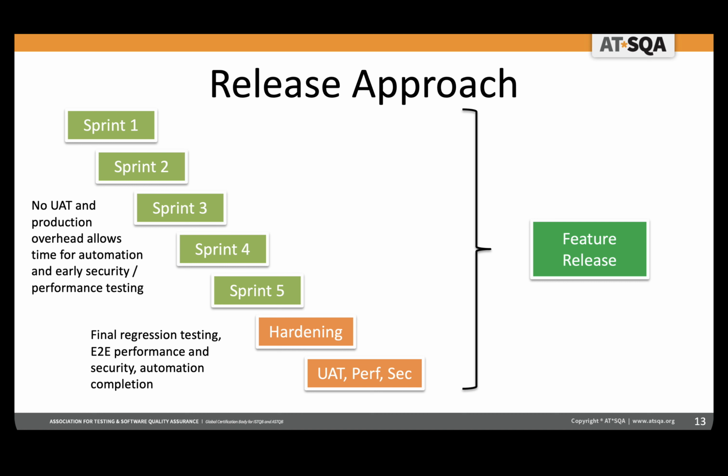Now, also in a very big project that's going to span months and months, having multiple releases will keep it on schedule. That way you've got milestones, you know when features are going to be released, and maybe every quarter you have a release. You've got it planned that way, rather than saying, well, we're just going to go forward releasing continuously, because generally that ends up in a continuous slip. Like our project that's at sprint 20 or so. So you want to make sure that you have this kind of control in place, milestones, ways to check this. Business gets a nice feature. Everybody in this team is still sane and ready to go on to the next feature.